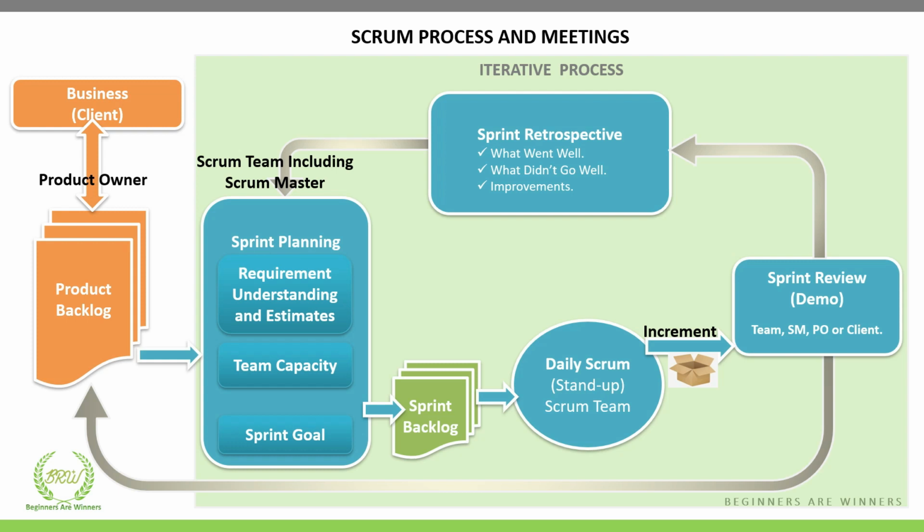wherein team members share what they have done and will do, or if they are dealing with any challenges or issues, or if they need any help. And if anyone feels a need for any other longer discussions, then they need to reserve a separate meeting as an action item from the stand-up meeting itself. So anyhow, this meeting will be reserved for 15 minutes only, and the team will discuss their roadblocks, what they did the previous day, what they will be doing today, or what are the various challenges they are dealing with where they need help.